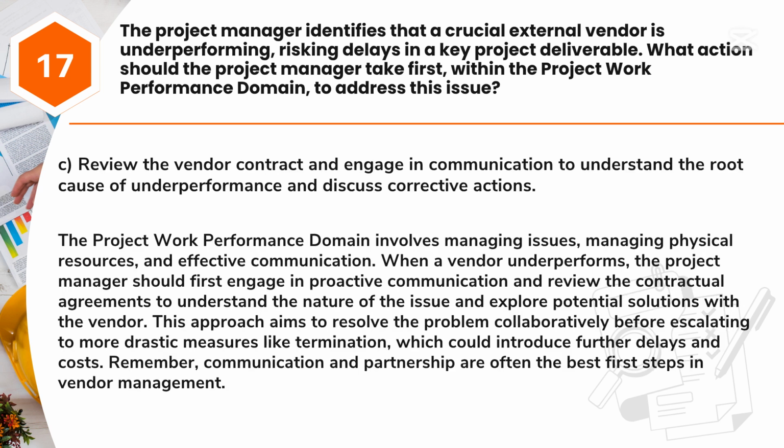Answer: C. Review the vendor contract and engage in communication to understand the root cause of underperformance and discuss corrective actions. The project work performance domain involves managing issues, managing physical resources, and effective communication. When a vendor underperforms, the project manager should first engage in proactive communication and review the contractual agreements to understand the nature of the issue and explore potential solutions with the vendor. This approach aims to resolve the problem collaboratively before escalating to more drastic measures like termination, which could introduce further delays and costs. Remember, communication and partnership are often the best first steps in vendor management.